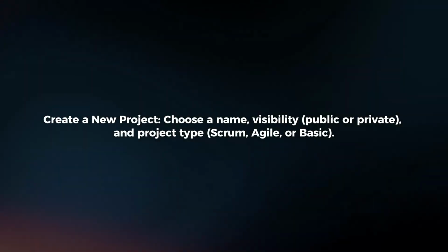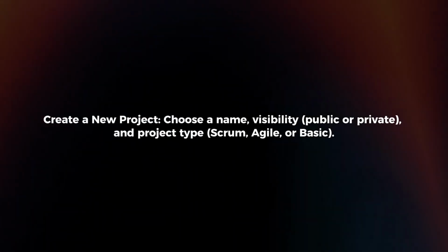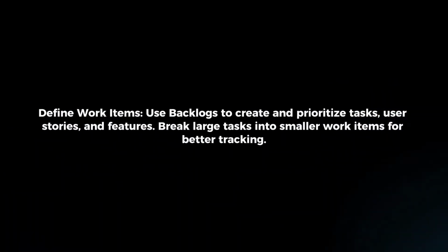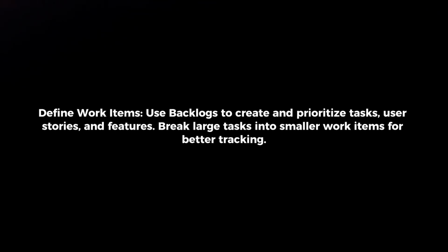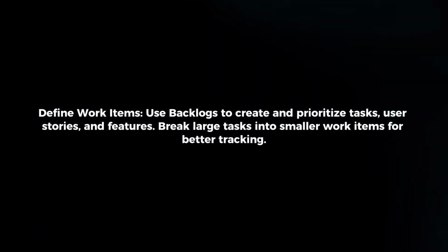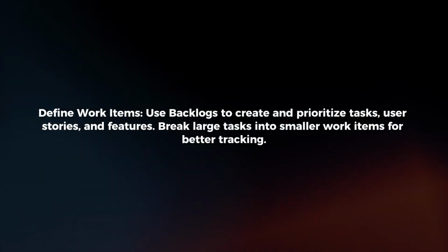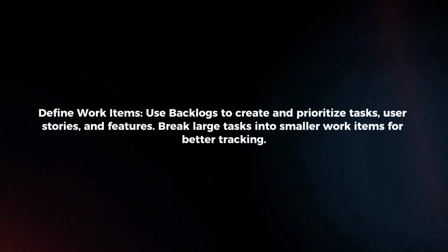Create a new project. Choose a name, visibility, and project type. Define work items. Use backlogs to create and prioritize tasks, user stories, and features. Break large tasks into smaller work items for better tracking.